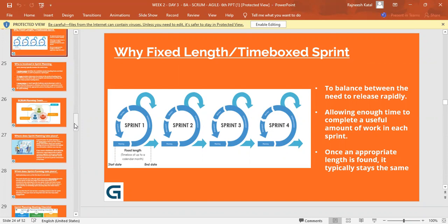So you're saying every sprint is exactly the same length? Yes, absolutely right. We do not change the timeline, because if you start your project with a sprint of 4 weeks, then it's kind of mandatory to have these meetings and sprints for the same interval. Exactly the same, not 4 to 5 weeks? No. If we confirm on 4-week sprints, it will be 4 weeks throughout your project. Why is this done?